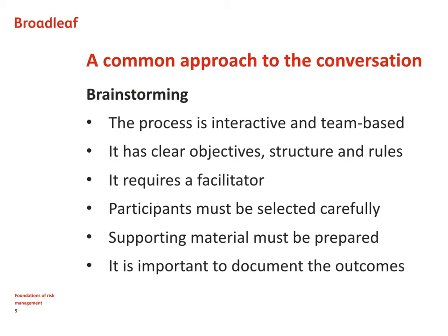Generally, brainstorming works very well if the people who attend the session are well briefed and have had time to consider the subject matter beforehand. And that's why in the previous module we talked about the preparation of a briefing note. The final thing about brainstorming is that it's important to document the outcomes very clearly, because sometimes the conversation can get awfully muddled and people can get lost. So it's very important that we retain a coherent record of what was discussed and what was agreed.